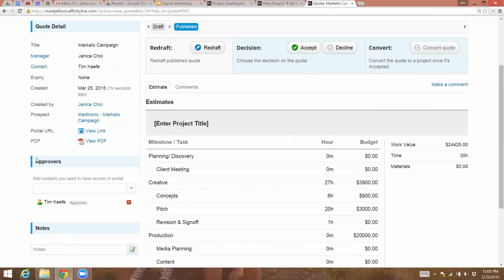Okay. So just really quickly, the whole costing process. Whether it's a new client or an existing client, someone will post specs for a new campaign, and then it's up to the costing team to make sure that our specs are consistent with previous costing, and also have enough detail that we can identify who's going to be involved, so that we can put rates and hours to it.